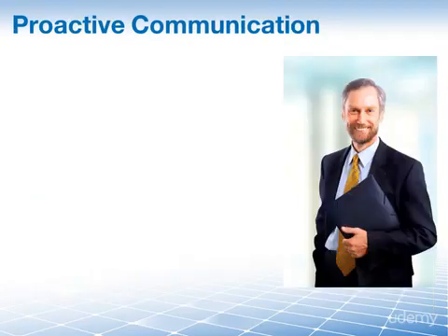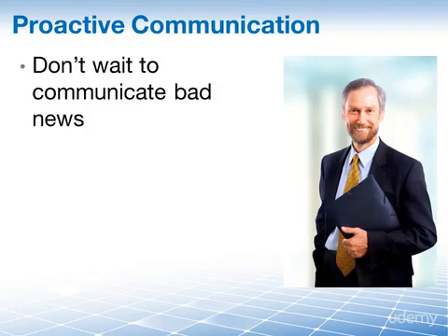We mention this a lot, but especially in project communications management, it's important to remember to be proactive in your communication. So don't wait to communicate bad news. One of the worst things you can do is to surprise your management or your customers during an important meeting and tell them that you are 2 months behind schedule. You should have communicated this fact months ago when it first became apparent that there would be delays.